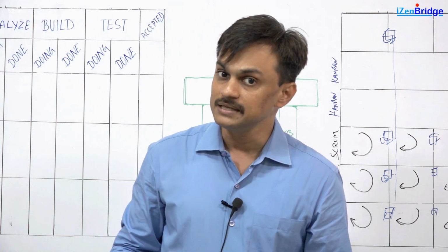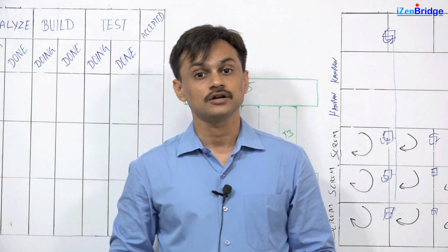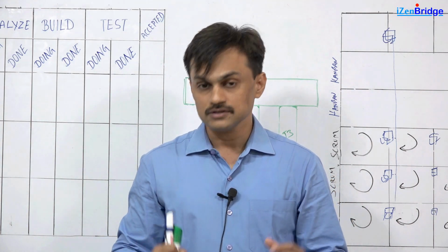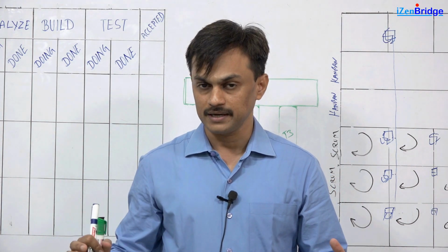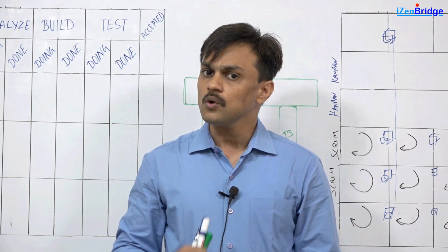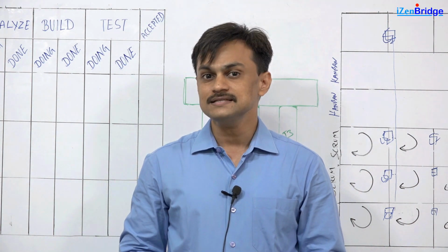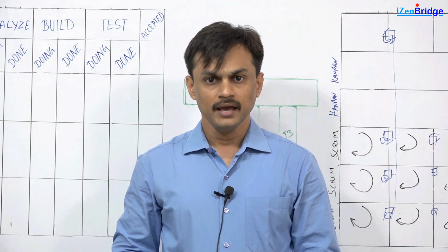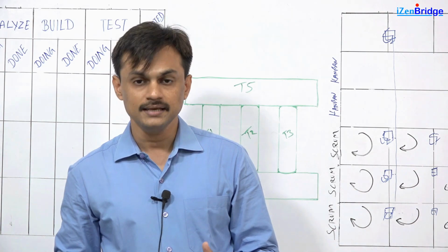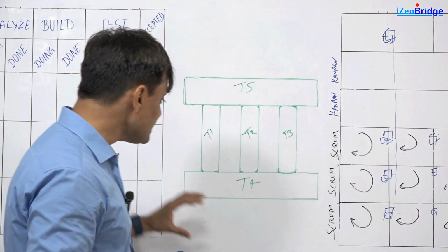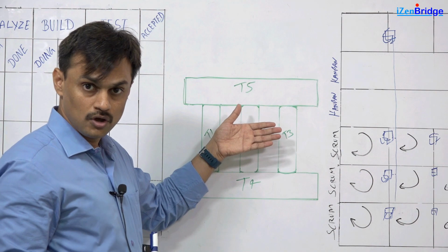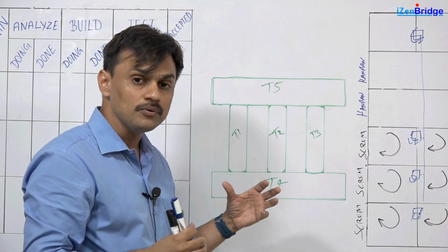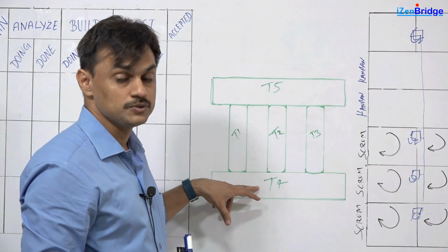Now most of us are familiar with Scrum, and we know that we use Scrum for developing complex products. And in case when you are going into a big scale development and you realize that to support the whole development, maybe some team can get benefit from using Kanban. In my observation, I see the teams which provide either as a foundation to other teams or they work as an integrator of other team components may get benefit by using Kanban.